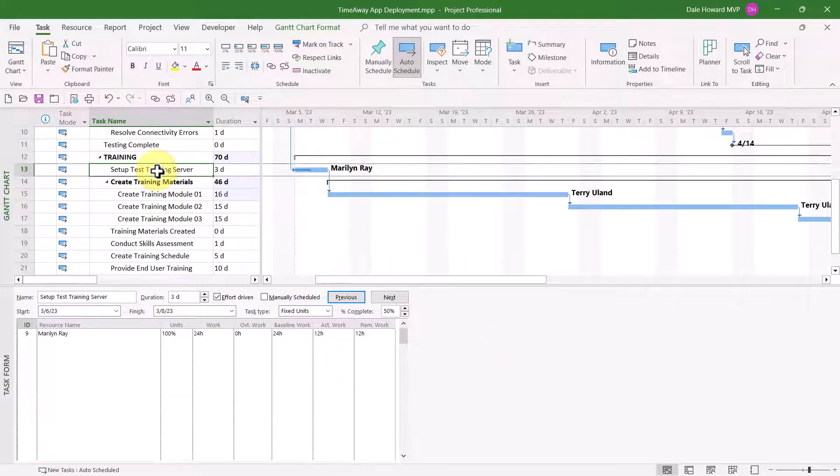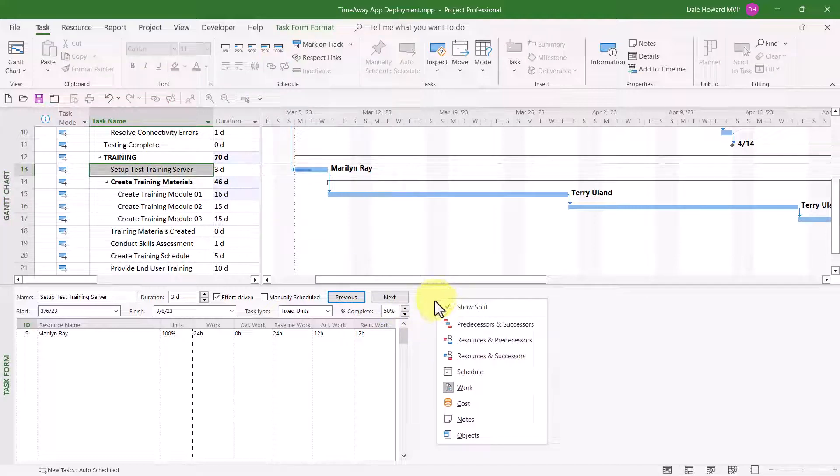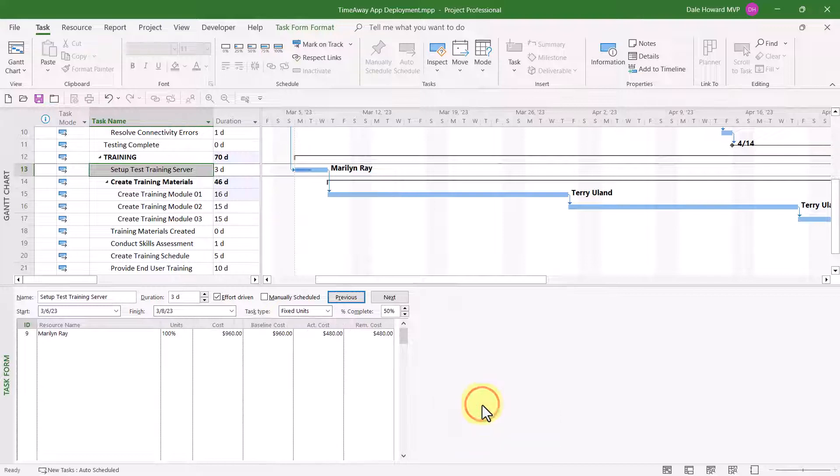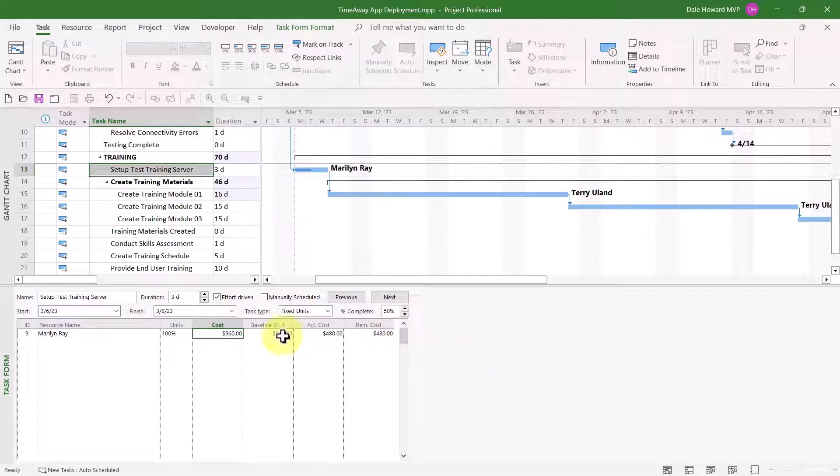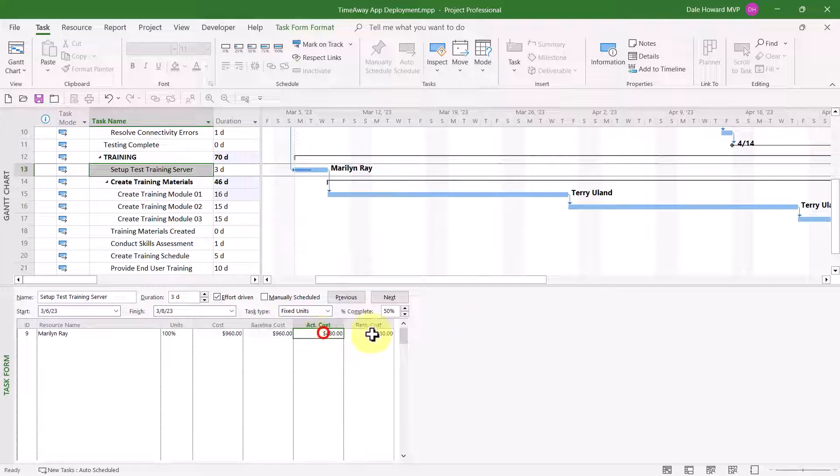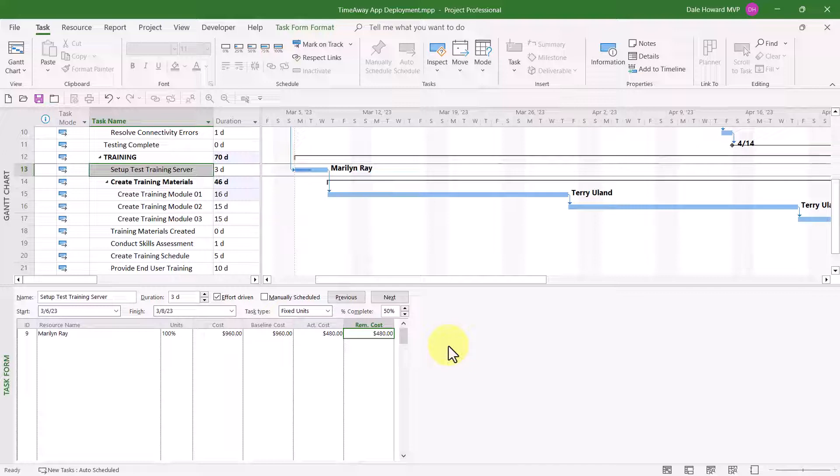Now, next thing we'll do. Let's go ahead and select a different task, and I'll show you a set of details known as cost. The truth is, this is really just for view purposes only. It lets you see the cost information for the resource or resources assigned to a task. For example, for Marilyn Ray, I can see the total cost of her work is $960. That is also the baseline amount. She has done some actual work on this task, so there's an actual cost of $480 and a remaining cost of $480. This is just for look-e-see purposes. You probably will never want to change anything here.